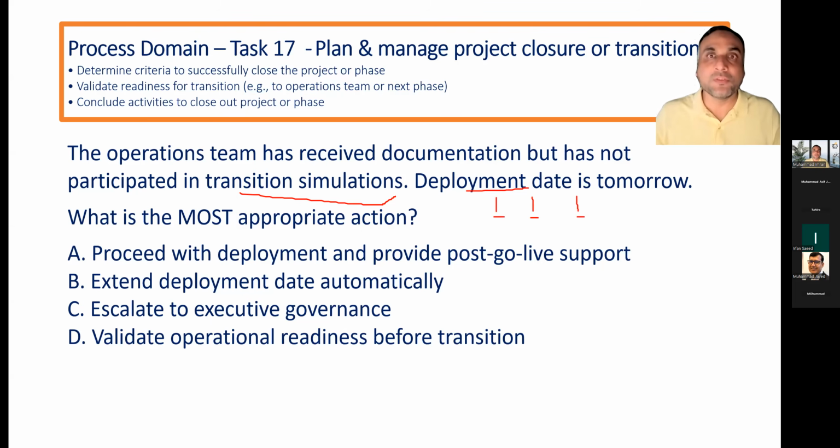If new people are added, or if someone's engagement is changed for the new phase, like for this phase, I need Asif. In the next phase, I don't need Asif, so I will remove Asif and his engagement for this phase. I just focus on what is required. In the next phase, I just need one of you and I will remove another one of you. So after every end of phase, we will update the stakeholder register, stakeholder engagement plan, communication management plan, governance structure, who should be reporting, which is also enlisted in the communication management plan. So everything is in stakeholder engagement.